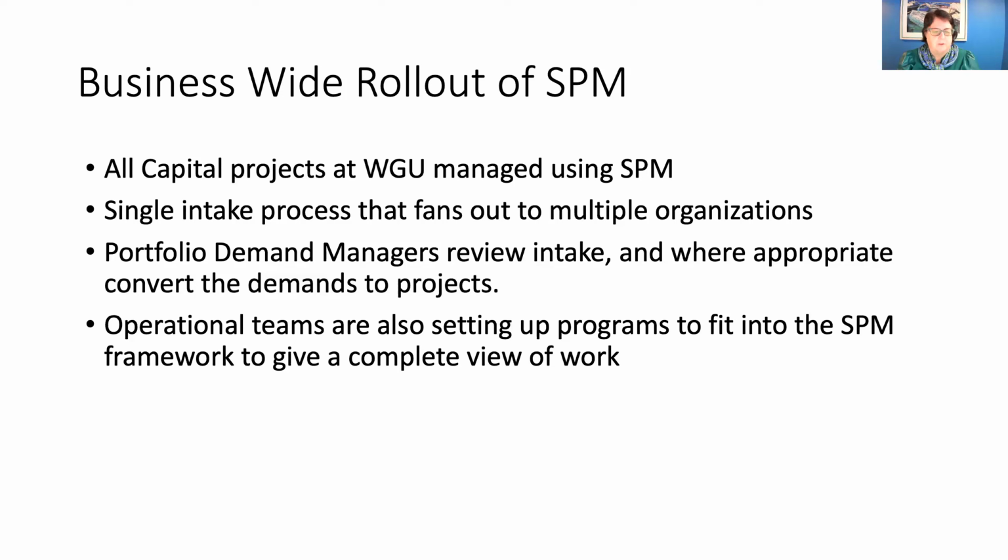So people will submit something through our intake process, and our portfolio managers, there are different demand managers depending on what part of the business they're in, will review the intake, and where it's appropriate, they'll convert these demands to projects. Another thing that we've done, because that speaks well to all the projects and initiatives that we have, but I'm also part of a ServiceNow team here as part of our operational teams that support infrastructure and so on. So we also set up programs for our operational teams so that it fits in the whole framework. And when our leadership are looking at things like resource management, it includes all the resources, not just project-related work.